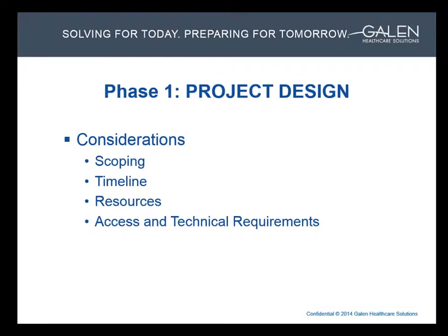Are all encounters in the source system going to be converted, or only encounters tied to clinical data that's in scope? The timeline for the conversion needs to be considered as well. Depending on which kind of EHR is the target system, there will be different testing requirements that impact the schedule. In addition, decisions made about the number of rounds of testing will affect the timeline. Some conversions can take up to 8 months, and others will take up to 4 or 5.